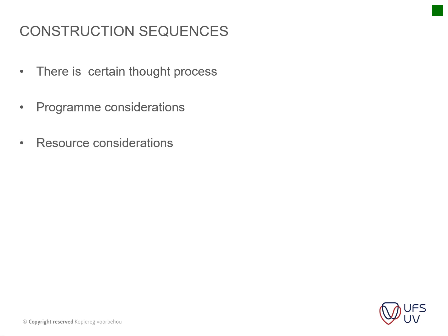Then you have your resource considerations — how much resources do you have available to actually do the work? You always try to get some continuity within your work. The example I always use is the bricklayer: if you sequence your work, you want to try and keep the same face bricklayer on a certain section, and you want to try and finish a section within a day to keep the signature more or less the same, so that you don't have a line where the bricklayer started and stopped, or where a new bricklayer had to come in and finish the job.